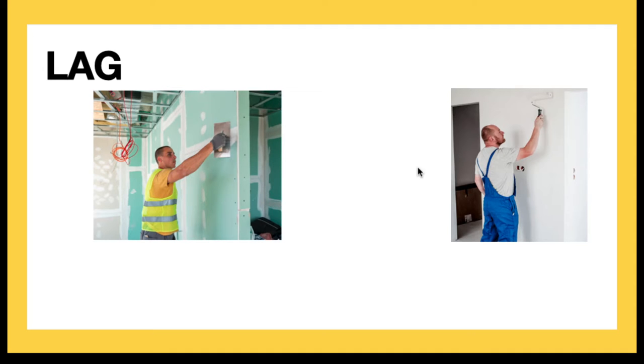However, it takes some amount of time for that drywall to dry and be ready to be sanded down and painted. Let's say that it's 2 days. That is a lag. That's a lag of 2 days. There's nobody working on that drywall, but we simply just have to let things sit.